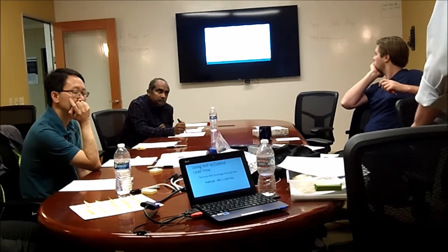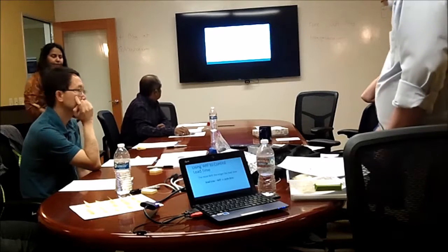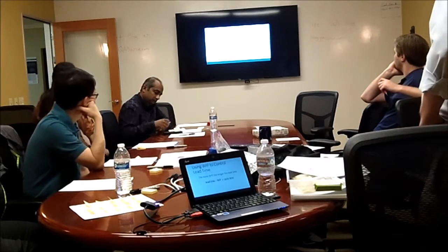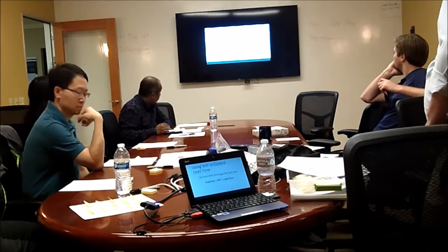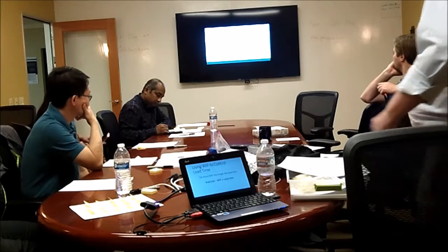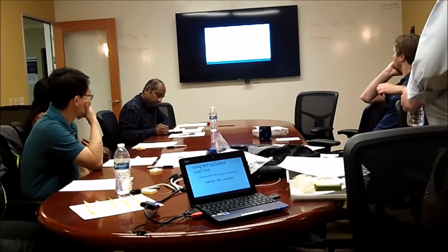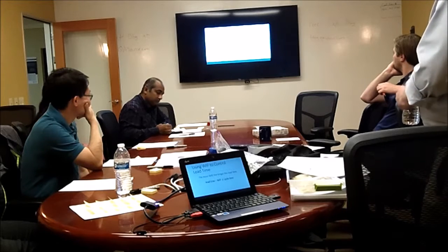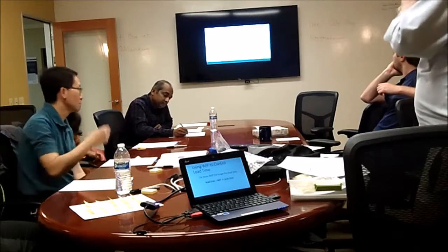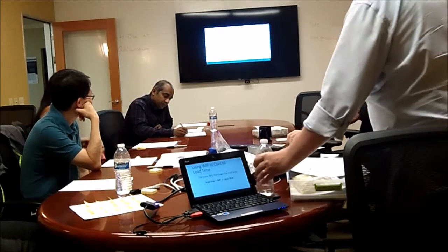We can calculate the lead time. The more WIP, the longer the lead time. And here's the simple formula that ties these things all together: the lead time is the number of units of work in process times the cycle time. So you can fill out that sheet and give us a lead time for this second phase that we did, round 2. Oh, okay. 80 seconds, plus second time is 32 seconds.